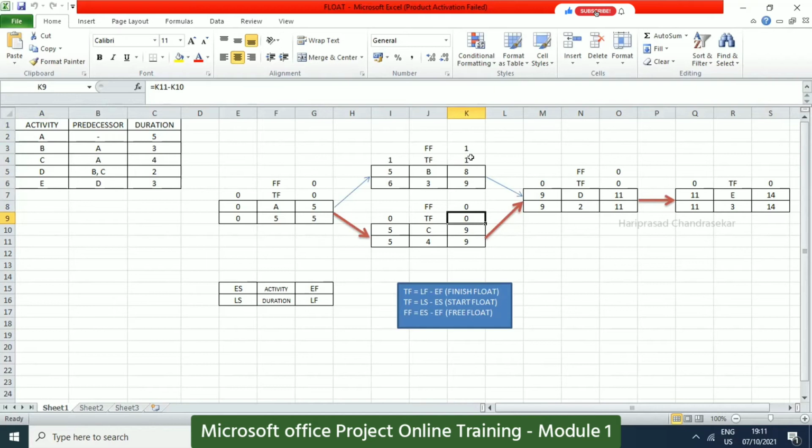Okay. Or here you have flexibility. Here we have total float. So we can delay this particular task by 1 day, and it won't affect the project end date. Or free float in the sense we can delay this for 1 day and it won't disturb the immediate successor. So that is what free float is. And total float just deals with the overall project end date. But sometimes free float will be different, total float will be different. So both will be different.